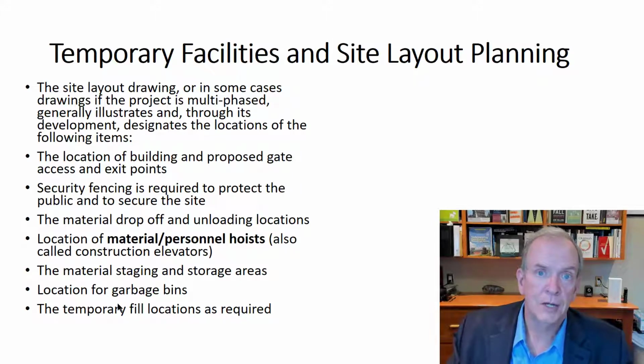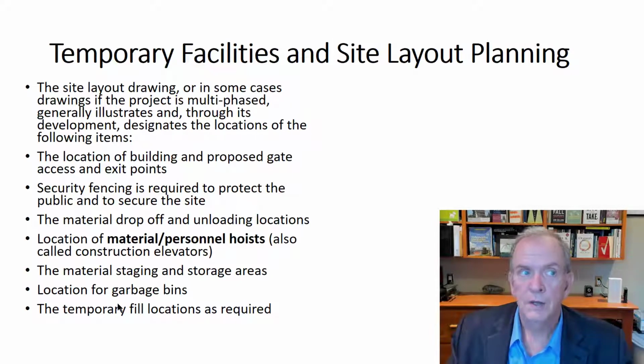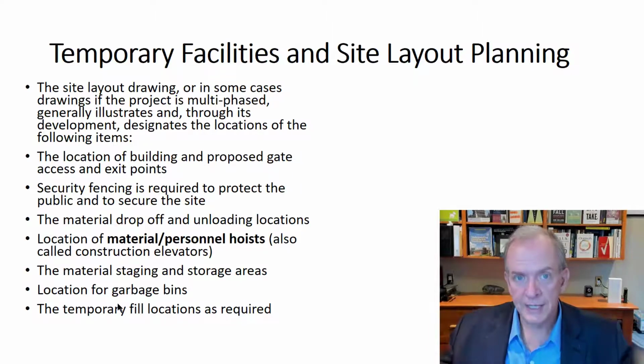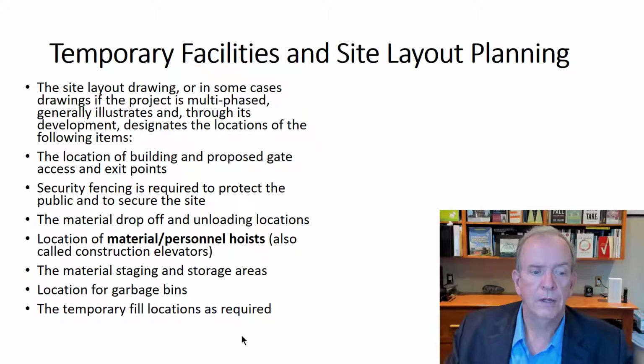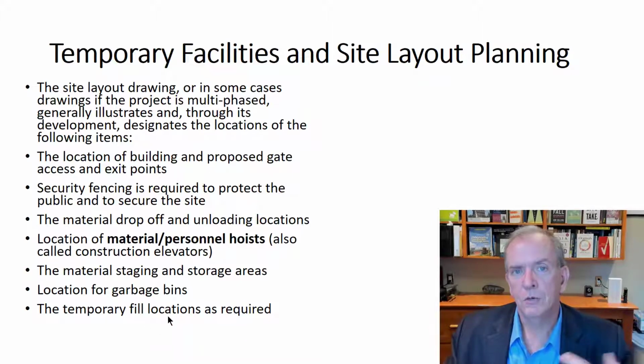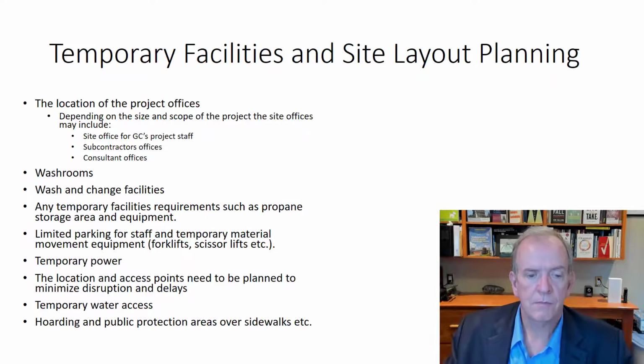Is it a LEED project? Do we have to separate the garbage? If it's in a large urban center, maybe there's suppliers that you just put it in one garbage and then they separate it. So there's different prospects that can be done. If you're excavating but you're going to reuse the soil, where are you going to store it before you backfill it or reutilize it?